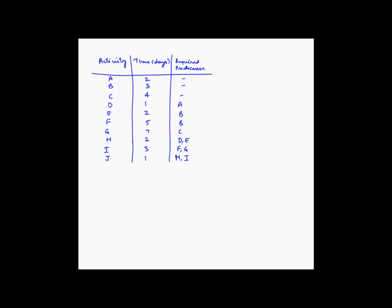Activity E has a duration of two days and is dependent on activity B. Activity F is dependent on activity B and has a duration of five days. Activity G needs seven days and is dependent on activity C. Activity H has a duration of two days and is dependent on activities D and E. Activity I has a duration of three days and is dependent on activities F and G. Activity J has a duration of one day and is dependent on activities H and I.